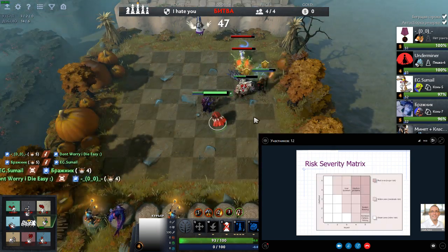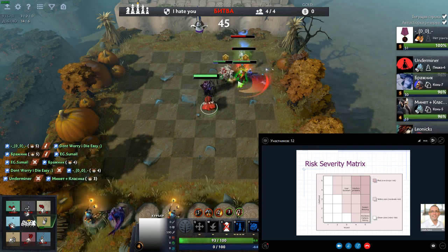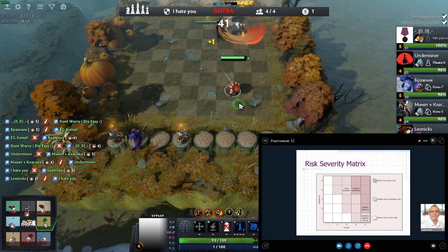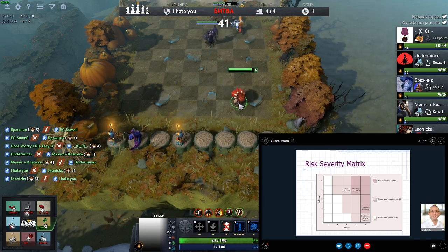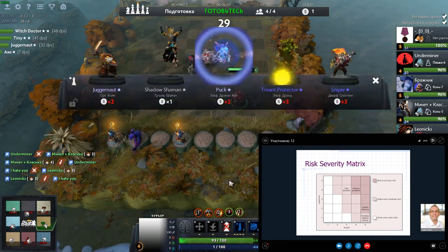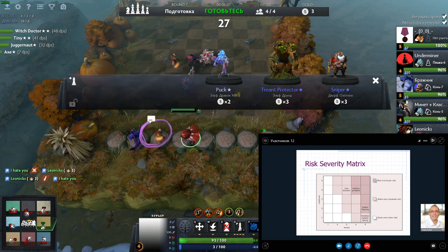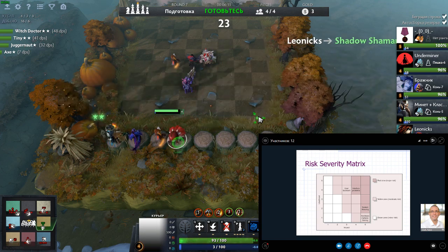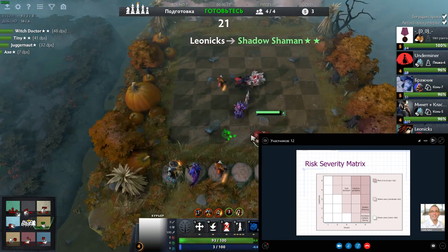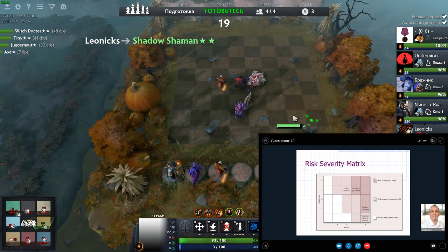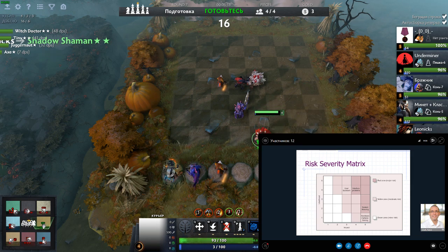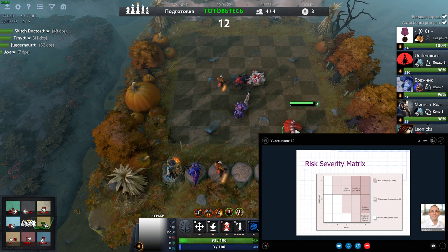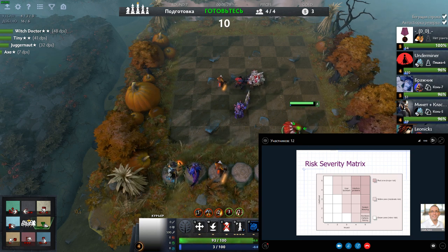One of the ways in which we present this, certainly in project meetings, is to identify what we have as risks and put them on what we call a risk severity matrix. So what we've got, two axes there: impact along one side, so number 5 is high impact, number 1 low impact, and on the vertical axis we've got likelihood of occurrence. So 1 is not very likely to occur, 5 is very, very likely to occur.